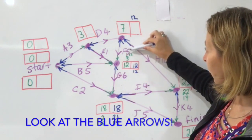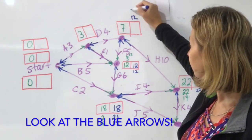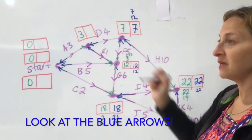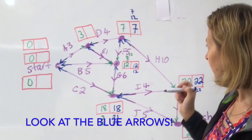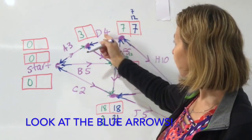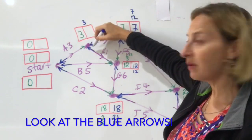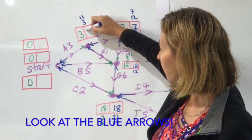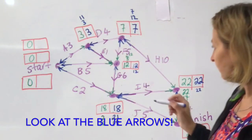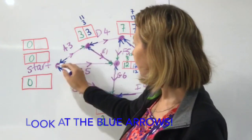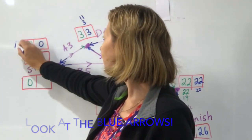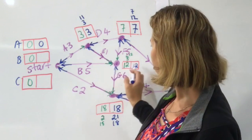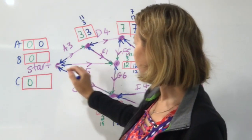12 take away 5 is 7. Going right to left, the smallest here would be 7. Then 7 take away 4 is 3, but there are two arrows, so I also check 12 take away 1 which is 11. The smallest is 3. Then 3 take away 3 is 0 — that's vertex A. I can label the vertices A, B, and C if I like.